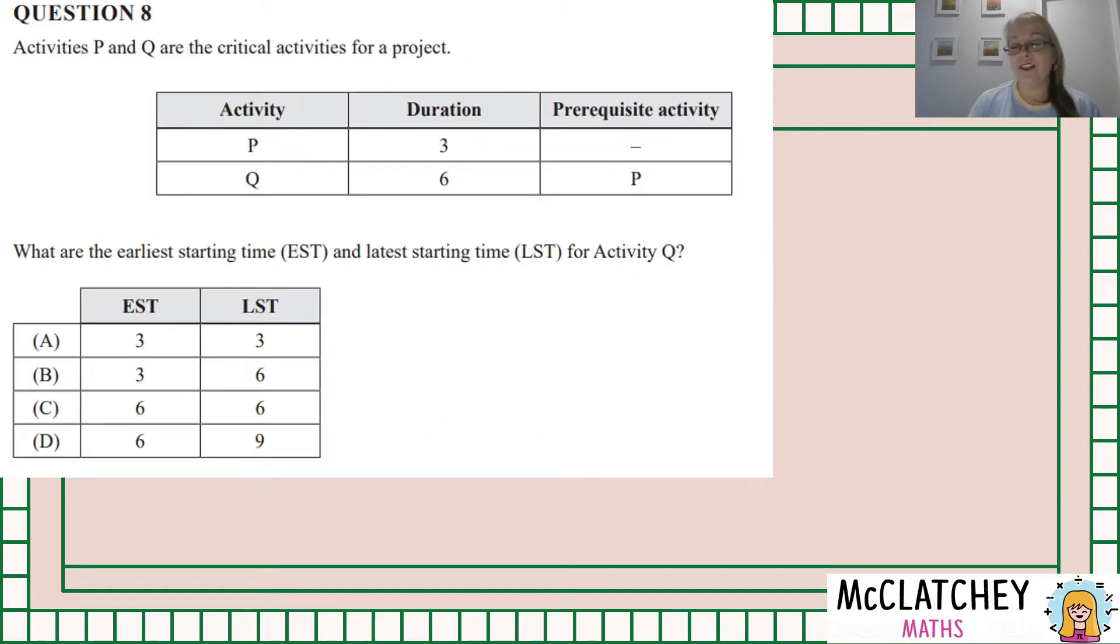And here's our second question for the video, question 8, activities P and Q. Now I know they're the same letters but they've got nothing to do with the other question. So put that one out of your mind, let's focus on this one, activity P and activity Q. One has a duration of three and we can see it's got no prerequisite which means it's a starting activity. And straight after this one happens, after P happens Q happens boom boom straight away. So because Q has a prerequisite it means it can't start until P is over which means Q can't start until three minutes has lapsed. So that's its earliest start time.